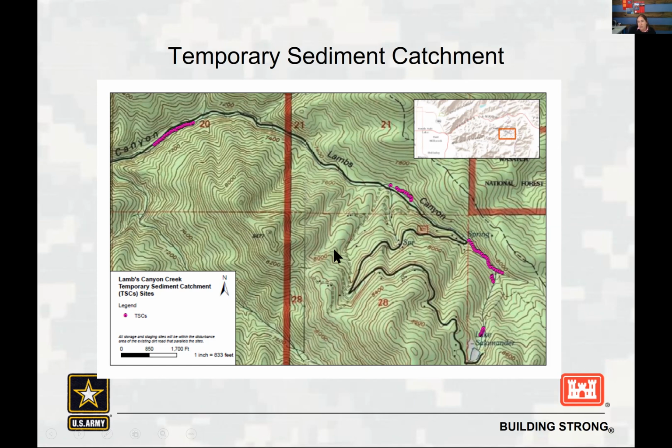However, this would make a difference if you're, for example, processing a culvert in a property that is 200 linear feet, and you decide that you're going to do 100 linear feet this year, and then 100 linear feet next year. You're separating 1 project into 2, and you're going to give us 2 applications. That project is 1 project that has no independent utility. So that is a single and complete project, and you can't separate it into 2. That's what basically a single and complete project is.